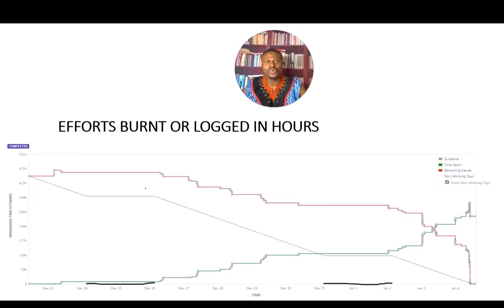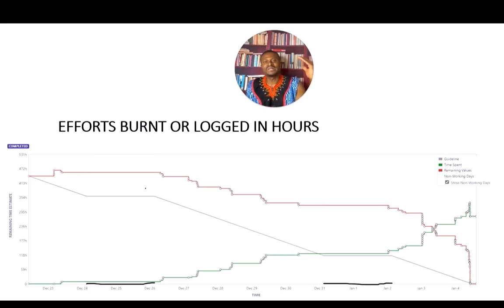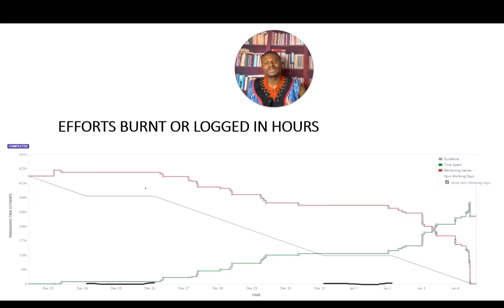Some teams plan their work in story points but then break down their stories into sub-tasks and estimate those sub-tasks in hours. You might ask why estimate in story points and then still allocate hours. Story points are primarily for planning purposes, but some environments also want to know how many hours are spent on a given story. By breaking stories into sub-tasks, they can track the actual effort in hours spent on each story.